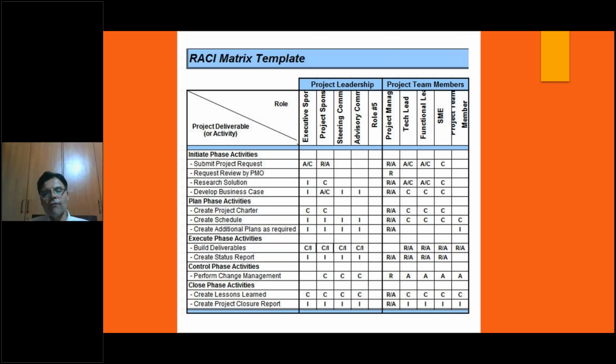So most of you would be aware of what RACI is. But the more important thing for you is to have RACI applied to your projects. Responsible, accountable, consulted, informed. This RACI matrix structure, very few project managers have I seen actually creating in this format. There cannot be too many templates for this, my friend, on RACI. Most generic template: you have your WBS, your deliverables, work packages, whatever you call them, on one side of it. And on the right-hand side, you have those roles and responsibilities carved out already.